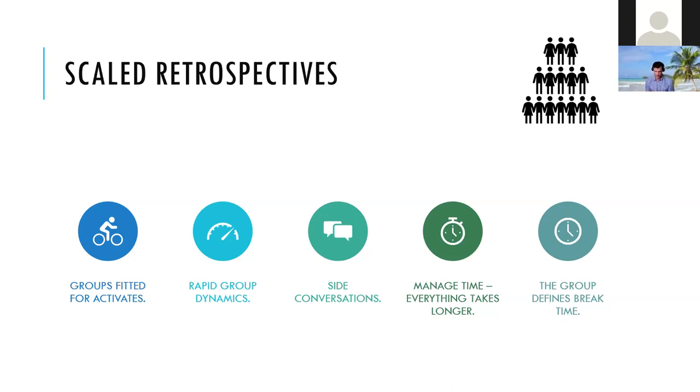I thought I mentioned it earlier, but thanks for bringing that up. I'll emphasize it one more time. It's not about just making a solution one time. It's about implementing it and making it a habit. When I'm using Trello, there is one additional section that starts something new, and there is a section, let's make it a habit, and it stays there. If we need to make a change in the behavior, it stays there for six iterations, and each time we verify whether it is happening or not, to make it a habit. And if it's for such a long time, there is a chance that it will be there.